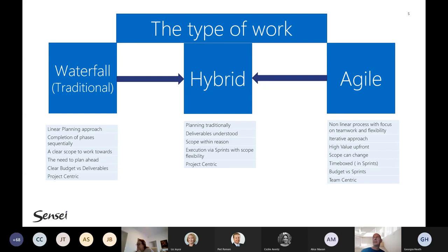So therefore, when it comes to budgets and scope, it is quite difficult to determine at the very start, this is how much money I need, and this is what you're going to get. Most of the agile projects are very much team-centric, where we request sprint budgets, where I know I have a particular team and that team will fully work on a particular project in a sprint. And I know I'm planning right now 3 or 4 sprints. And based on that, I do have the ability to produce or create my budget. I refer to that as a time-boxed way of managing projects.